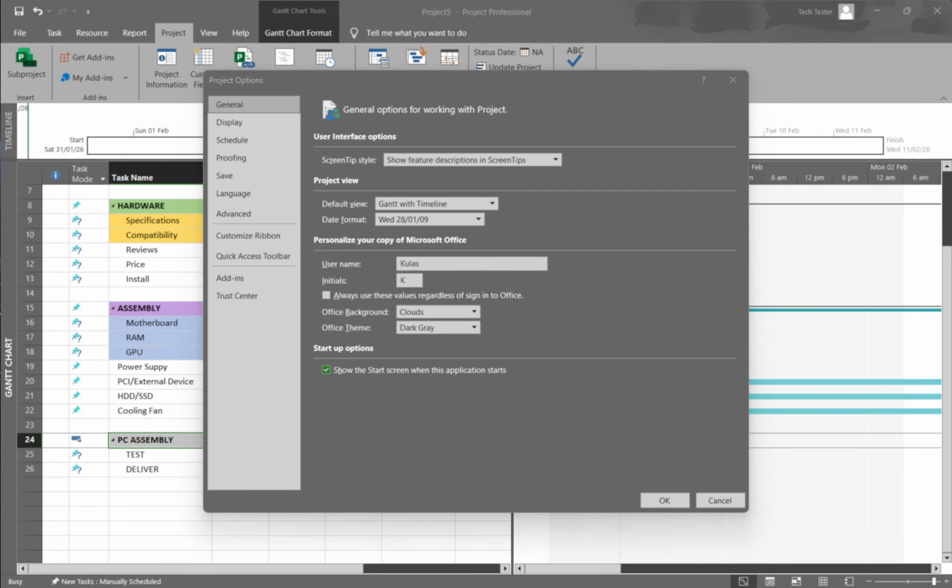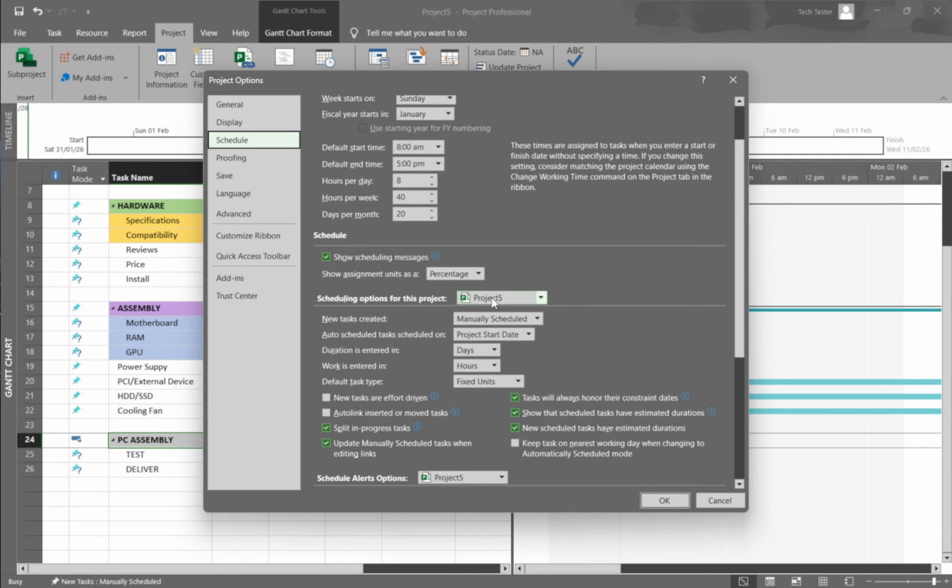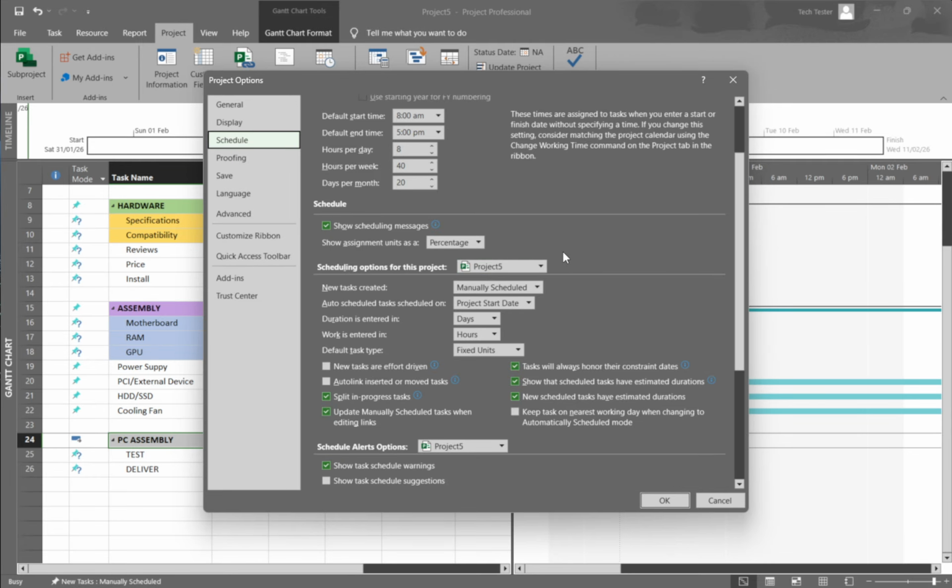That's it. By updating the project start date in Project Information, you're guiding how the entire plan is laid out, ensuring all automatically scheduled tasks align with your new kickoff. This keeps your timeline consistent, your dependencies intact, and your schedule easy to manage as plans evolve.